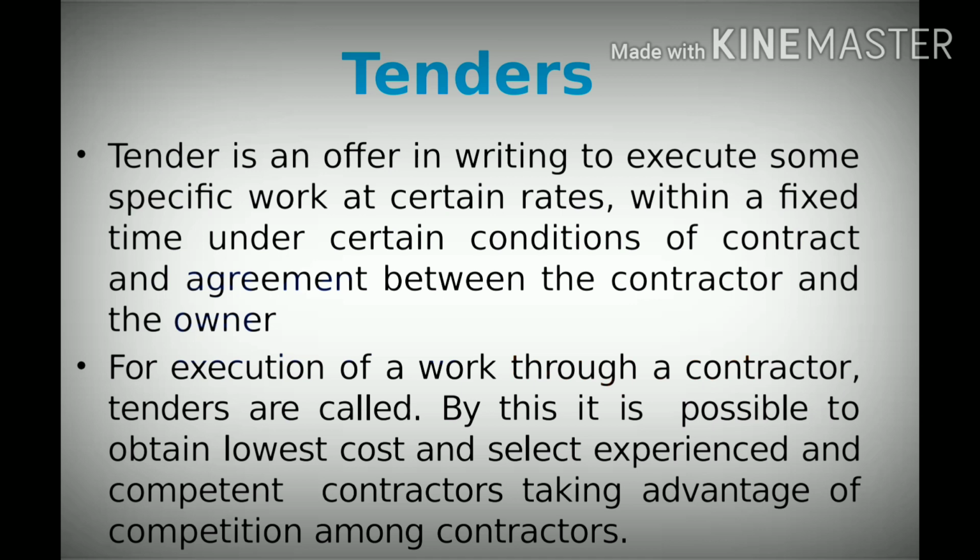So, our first topic is tenders. Whenever a government agency or a firm wants certain works to be done or any purchases to be made, they float tenders in order to get the work done at competitive prices. The person who got the lowest price agreeing to the terms and conditions will have to sign an agreement stating that he will perform the said work as per requirement of the client. The selection of contractors can be made based on his experience and capacity.